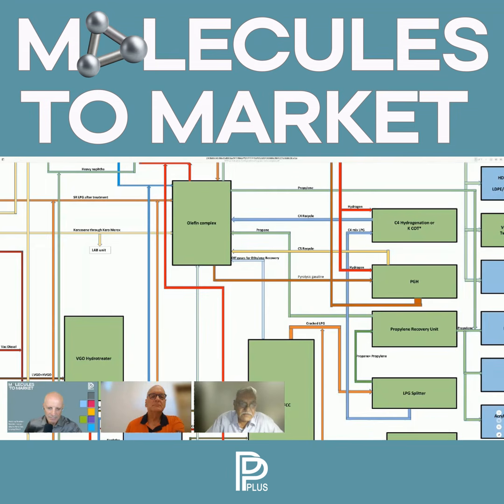For instance, in India, the important norm is that for any mega project which I set up, 33% of the land on which I put the facilities has to be greenbelt. That means if 100 acres is the plant area, 33 acres has to be dedicated to greenbelt. So I can locate the plant in the other 67 only. So that kind of stuff, there are many regulations of that nature. That is number one.